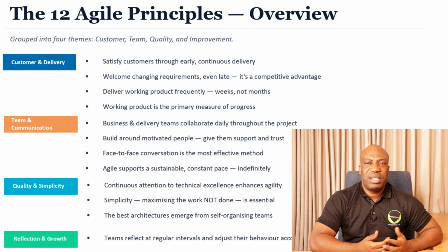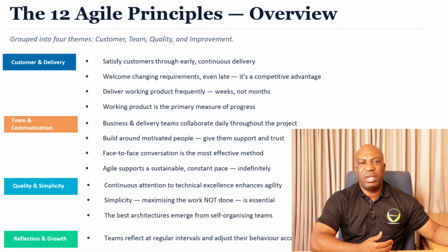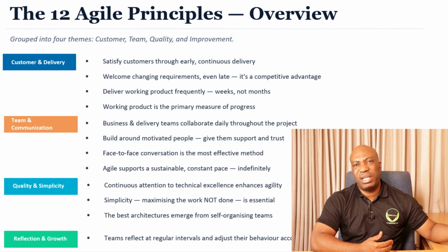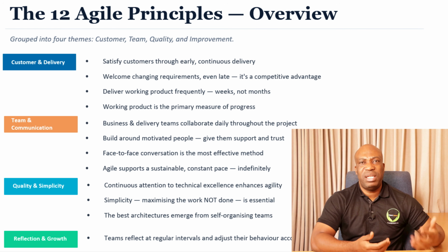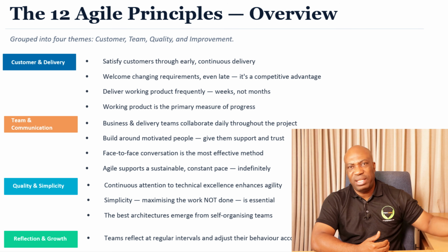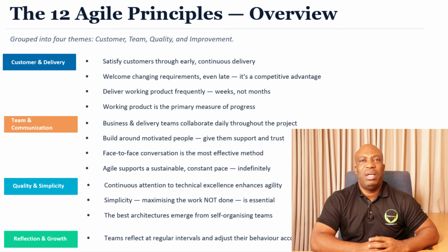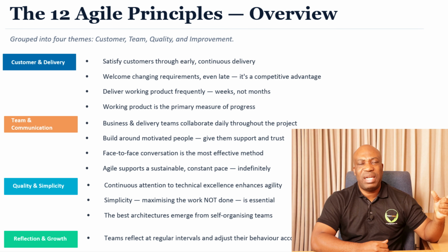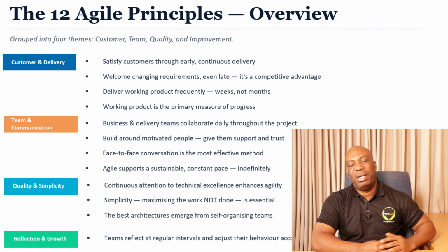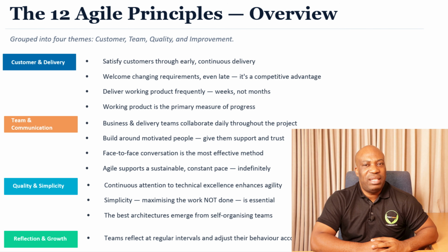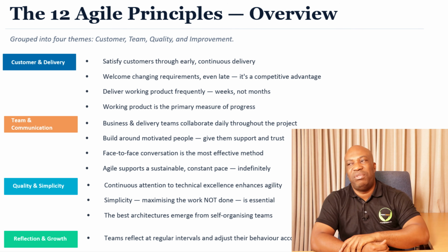How are changes coming in? Changes can come in through the product owner. The product owner is going to accept or reject some changes. Assuming the change has been accepted, the product owner will add it into the product backlog and also refine and prioritize the product backlog to make sure that the most valuable features are done earlier than the less valuable features.